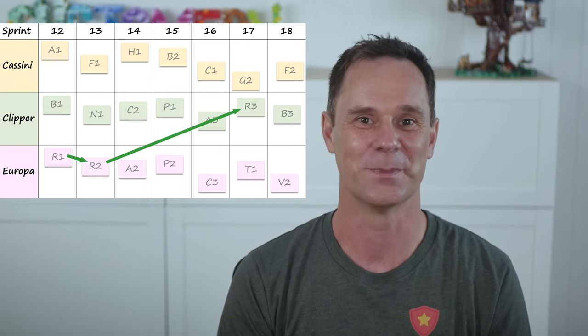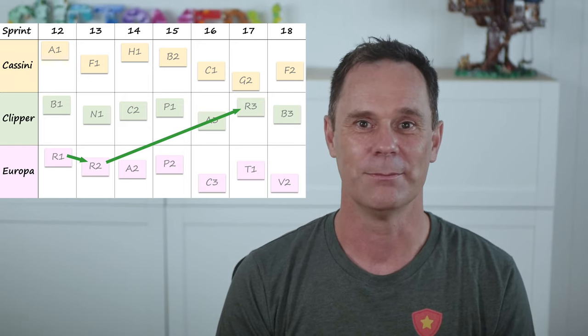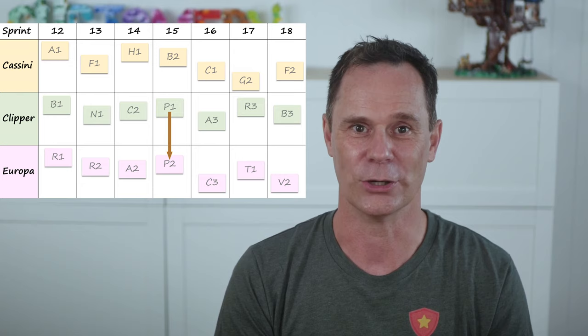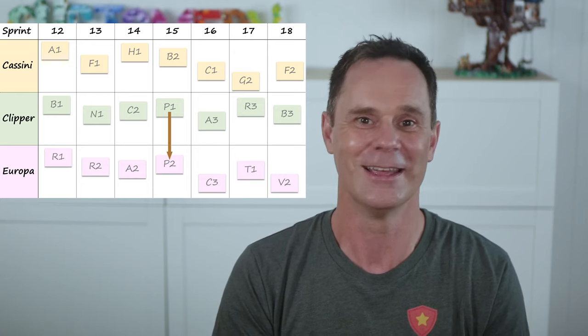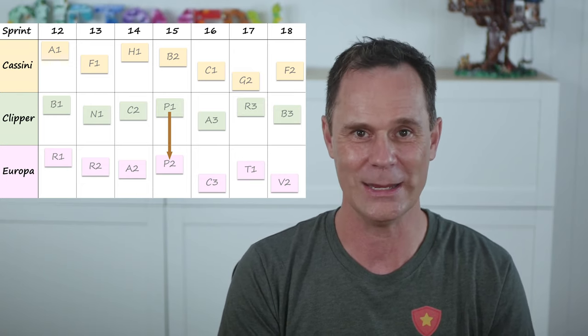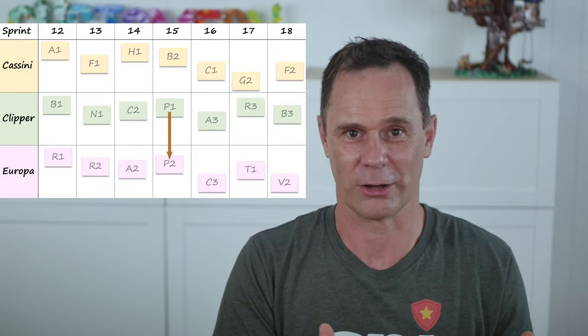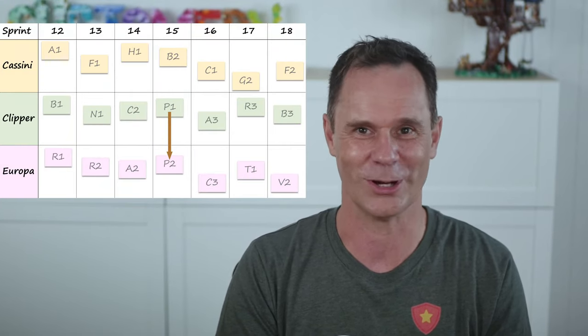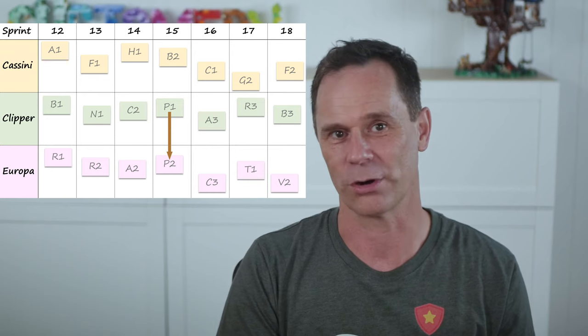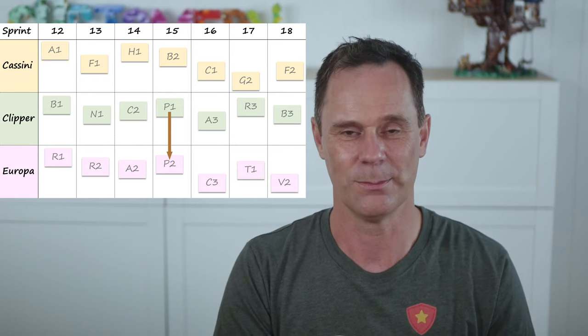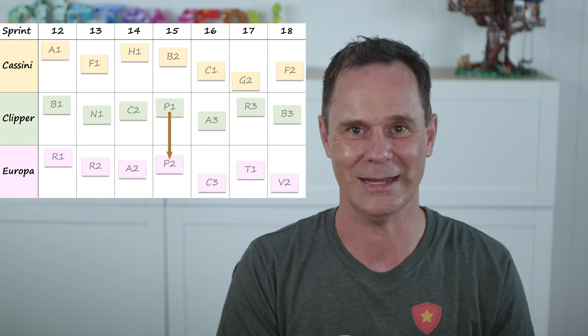Everyone's still happy so far. But with feature set P, Europa is dependent upon Clipper finishing P1 in the same sprint. Oh, that's awkward — that's too close for comfort for most teams. Clipper and Europa should have a grown-up conversation with the product owner to renegotiate the order of the backlog and re-sequence P1 and P2.